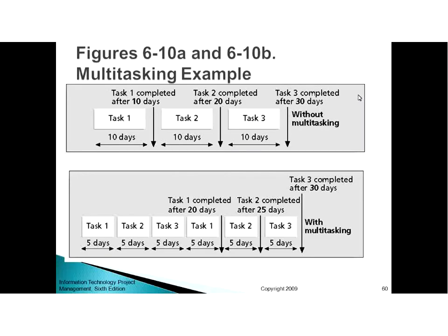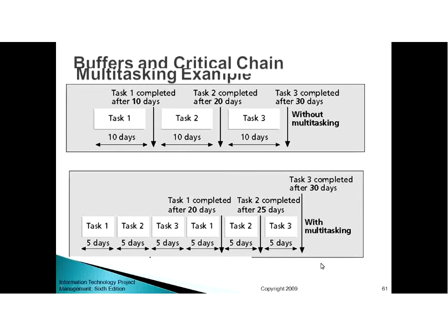Now, this is what we saw: without multitasking, task 1 completes after 10 days, task 2 after 20 days. And if you apply multitasking, task 1 completes after 20 days, task 2 completes after 25 days, and then after 30 days, task 3 completes.